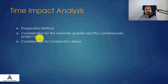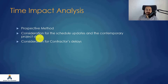The only difference between the Impacted as Planned and the Time Impact Analysis is which program you are using. For the Impacted as Planned, you use the baseline schedule throughout your analysis. For the Time Impact Analysis, you use the schedule update. How to choose the appropriate schedule update will be discussed later in the course.